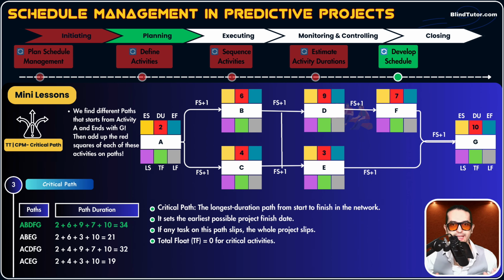So starting and finishing activities that are in critical path is super important. We cannot delay the start of these activities. There's no room, there's no slack, there's no flexibility. We find critical path because activities located on critical path are super important and need more attention because we cannot delay them. Their total float is 0.